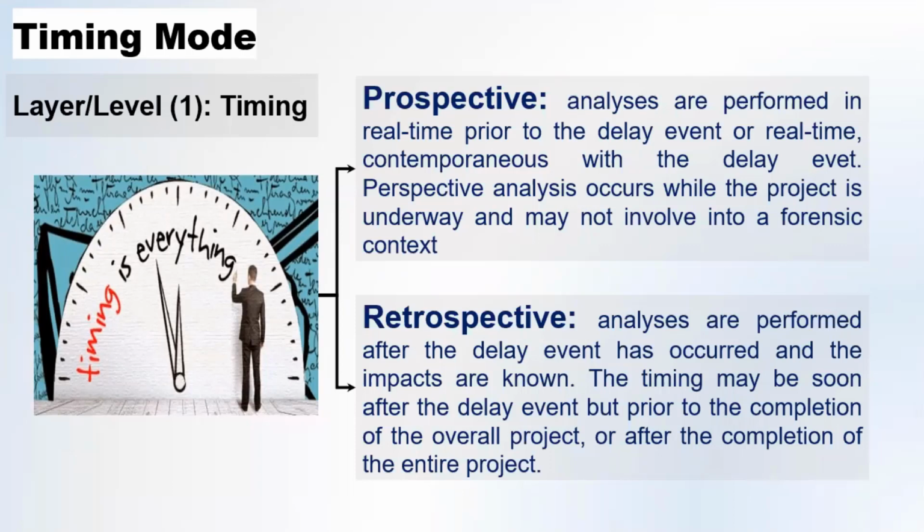So most of the measures implemented in the fragnet, the network that represents the delay event, are estimated. We are following estimations, most probably best guess estimations.